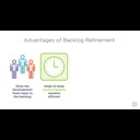"As the product owner," Alan answers, "Dave is responsible for the creation and ordering of the product backlog. But as a collaborative Scrum team, you must all work together to ensure that the items that will be loaded into the next sprint are refined enough that your next sprint planning session is effective. When a Scrum team does not invest sufficient time in backlog refinement, they usually find that the sprint planning sessions become very long and frustrating experiences. The items selected for the sprint planning sessions tend to be vaguely defined, leading to extensive debate and discussion before an estimate can be given, and often more questions are raised during sprint planning than are answered."